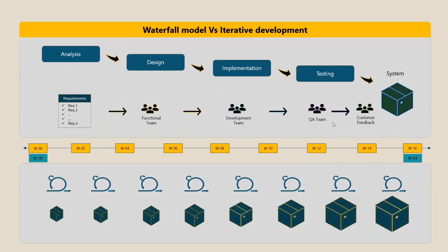Now let's put Waterfall Model and Scrum together. And let's see why we need this. In Waterfall Model, we design the goals too early. So if the project is for like 4 months, as you can see, the project here lasts for 4 months, there are already 8 iteration cycles, 2 weeks each, which are happening in an iterative delivery in SAFe. SAFe has shorter learning cycles, which is shorter cycle time. It does not create a huge batch of requirements.